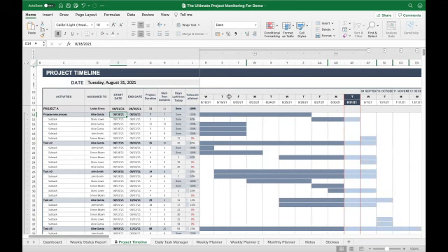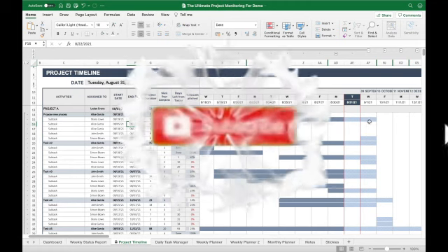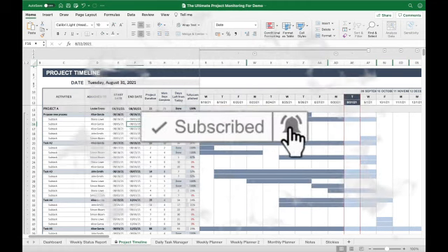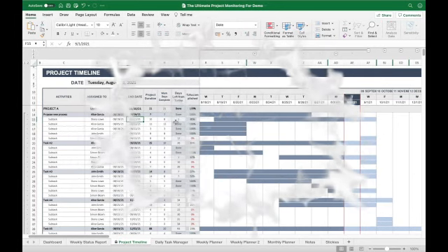For example, we place here that the project start date will be on August 19, 2023. You can see here that it automatically changes the gantt chart. And if we set the end date to a later date, like for example, November 1, you will see that it is not yet the same color as the ones that are completed already. It is lighter blue, which indicates that this is not yet finished. And if you count, you can see that you have 1 day remaining from today.